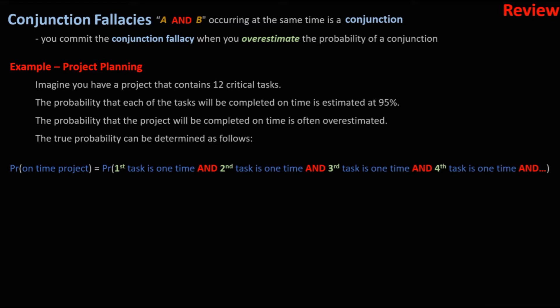The probability that a project comes in on time is the probability that the first task is on time and the second task and the third task and the fourth and so on.